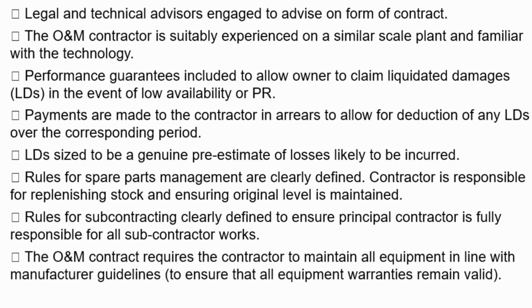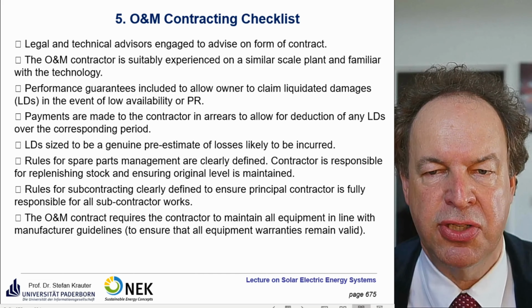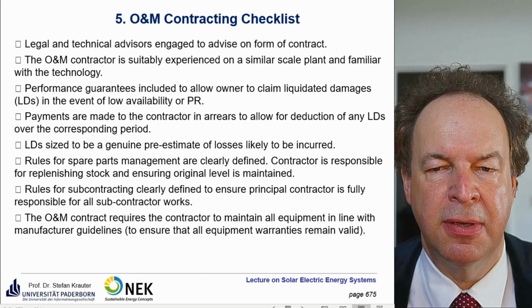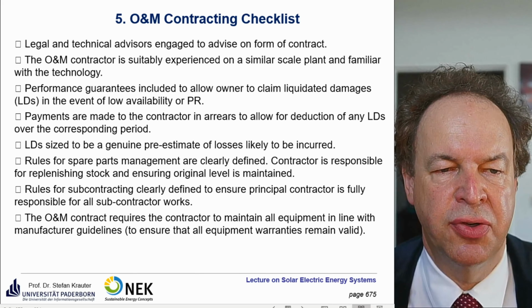And the O&M contract requires the contractor to maintain all equipment in line with the manufacturer's guidelines to ensure that all equipment warranties remain valid. That's also important. If you modify something, then the warranty may not be valid anymore, and this is a serious issue.